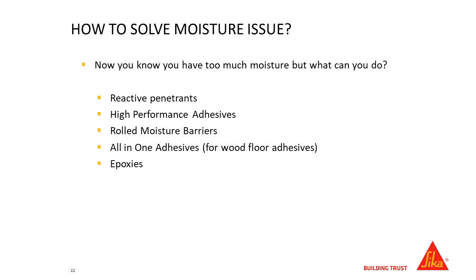So once you've got your moisture readings and you know, okay, I have a slab that's emitting 95% relative humidity, I know my flooring requires 90, I have a problem. I cannot install over this slab, it's non-compliant, and I will void my warranty. So I know I have a moisture issue. What am I going to do to solve it?